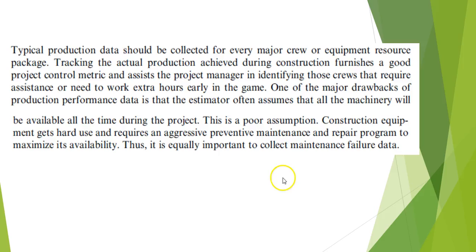One of the things that affects production factors is if you estimate that all the machinery will be available all the time during a project, and this isn't a good assumption. One of the nice things about modeling, even though it's based in probability functions and computer model techniques, is that it does represent or replicate real-life conditions.